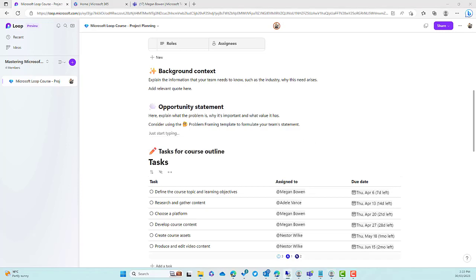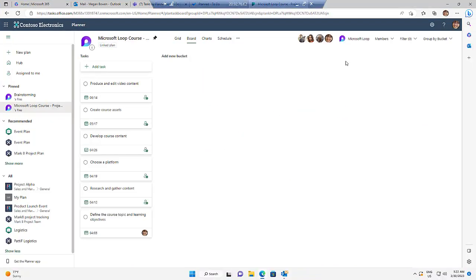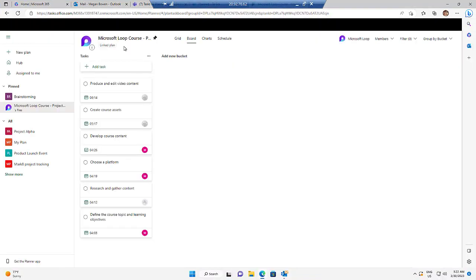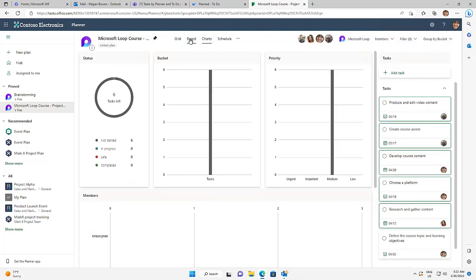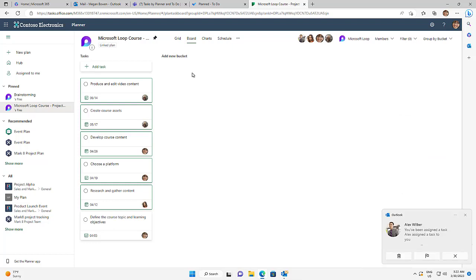If I drag Megan's environment back across and give it a refresh, you can see at the top that we've got our Loop page's name. It is a linked plan — we can use our charts, schedule, grid, everything that we normally would. You can also see down the bottom that these are coming in as notifications into Outlook. So if you assign a task inside of a Loop workspace in a task list component, it will notify that person you assigned the task to.